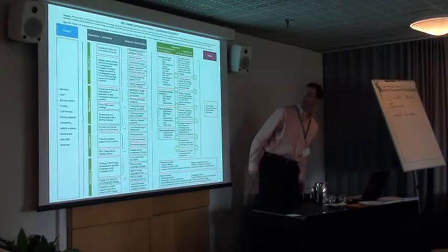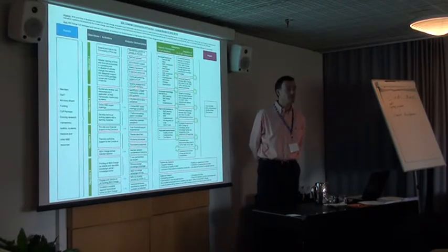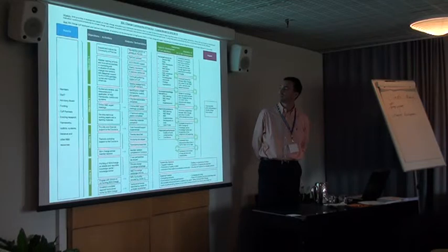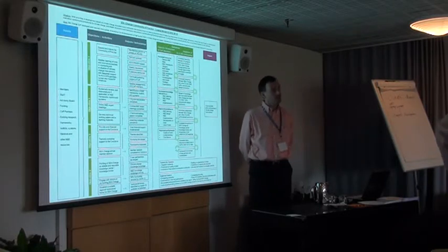I mean, as a strength, it's pretty attractive. Weaknesses: it comes across as complicated. I think it's missing the start and the end, picking up on your point about the difficulties of linking the outputs to outcomes. What's missing is your baseline that establishes what the problem is, and then what is the solution you're aiming for. Because unless you've got your start and your finish, where is all that going?